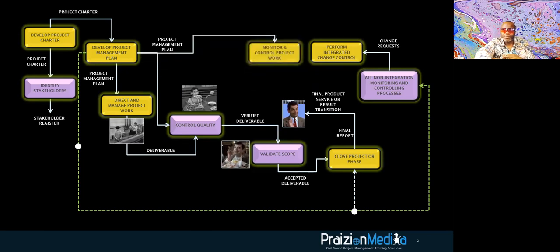Now, the project management plan, like I said, goes everywhere. So it goes to this other process, monitor and control project work. And guess what? Monitor and control project work gives you work performance reports. Now, what is the relevance of work performance reports? They are an input to you looking at change requests and saying, based on our current report, the state of this project, it doesn't make sense to take on more change requests.